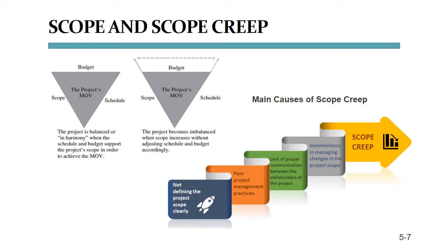That is the typical acceptable way of introducing extra scope into your project. In other words, it takes an approved scope change management process in order to adjust scope so that budget and schedule can also be adjusted. And these change requests have to be authorized by the project sponsor.